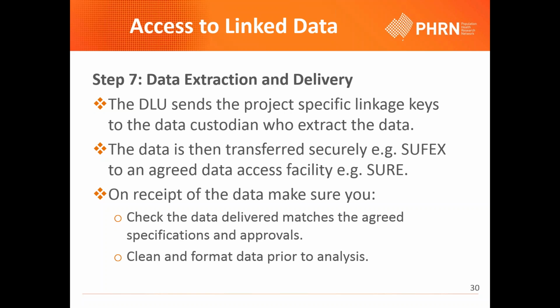When you receive the data, the first thing to do is check that the data you've received matches the agreed specifications and approvals. If you notice any discrepancies, it's best to get in contact with the data linkage unit straight away, because you may require a re-extraction. When you've got the data that you asked for, make sure you allow enough time to clean and format the data prior to beginning your analysis. Researchers often suggest allocating 3 to 6 months to clean and format the data, so that your merged data set will be standardized.